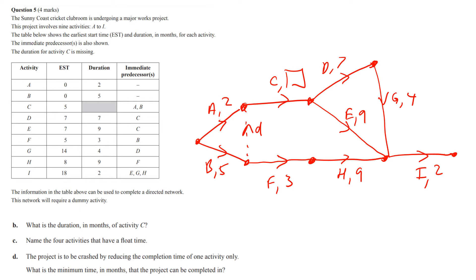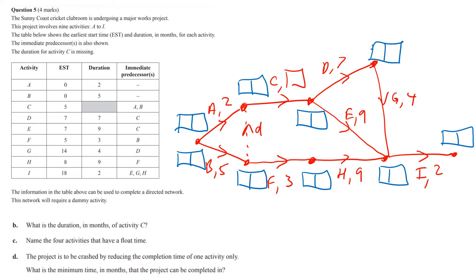I've redrawn the network diagram and now I need to add the EST boxes. I'm putting these in blue to contrast with the red. At the start, EST for A is 0, EST for B is 0. C has an EST of 5. D has an EST of 7. E has an EST of 7 — that makes sense because they're both starting from the same point. F has a starting point of 5. H has an EST of 8, because 5 plus 3 equals 8.